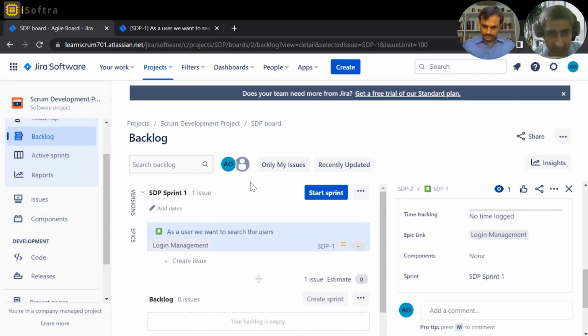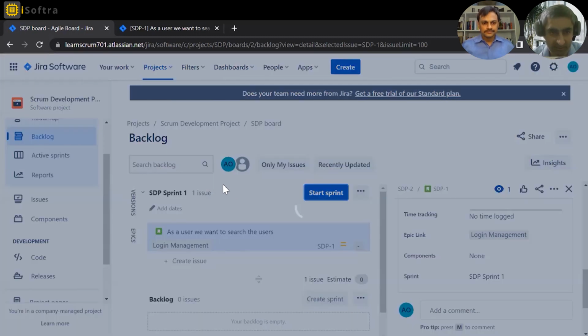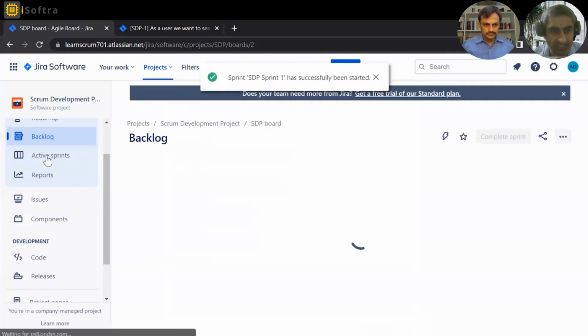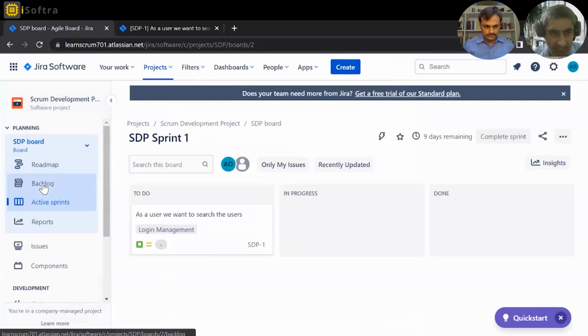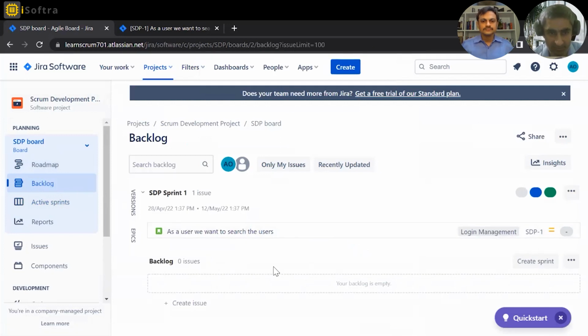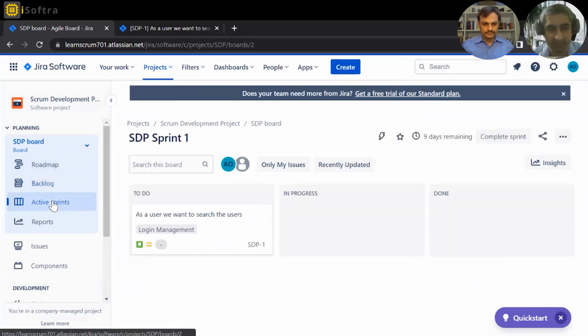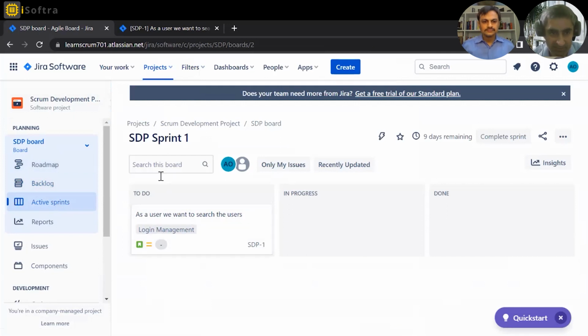Okay, so this is one portion, one screen, and suppose I have started this sprint. And okay, this is a 2-week sprint and started from the 28th as a date. So we also have a daily tracking location over here. Like this is a backlog where we have all the stories that are available, but we want to track our current sprint during our daily Scrum meetings. So this way, we can check, okay, on this particular story, if there are 4 or 5 subtasks, that story is assigned to person X, we can track where we are with the help of this active sprint board.